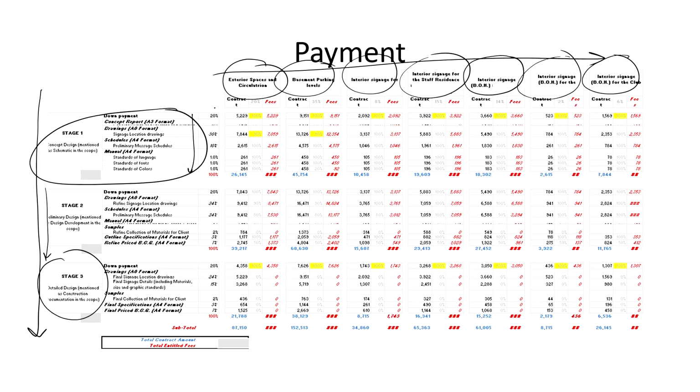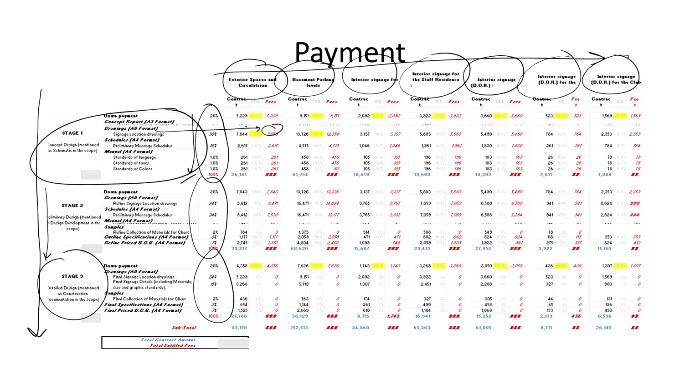It shows the amount of payment which will happen at stage 1, what will happen at stage 2 and what will happen at stage 3. Each and every sheet has been marked with a certain amount. In case these drawings are missing, we can easily say that this amount will not be included in the contract amount. So, the entitled fees can vary based on the sheets or drawings submitted.